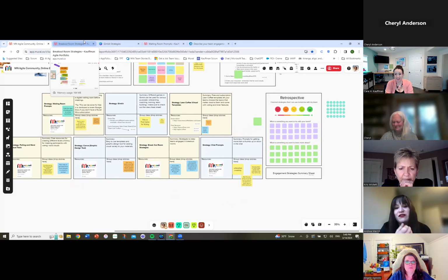I like lean coffee too, even for retros with my teams, because it forces them to bring their topics. So you have to have engagement in that way. Otherwise there's nothing. But then we do time box and do thumbs up, thumbs down voting at the end of like 10 minutes: are you okay? Do we want to keep talking about it? I think that helps speed through a variety of topics. And if there's some lighter ones in there, usually I have a few that I'm like, these are some heavy hitter things that we should probably talk about. So I'll pepper the field a little bit.